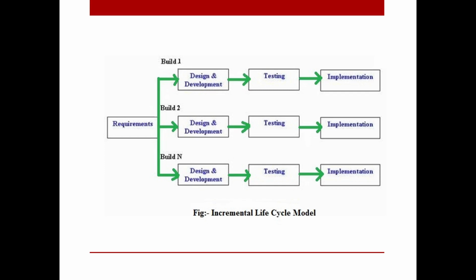There are some disadvantages of the incremental model as well, such as it needs good planning and designing. If good planning and designing is done, then the model works really well. Incremental modeling needs a clear and complete definition of the whole system before it can be broken down and built incrementally. If the needs are not clear, if it does not have a complete definition, then if we break it down and build a model, maybe the model might not have everything as expected. The total cost is higher than the waterfall model. That is why at some places incremental is not preferred.